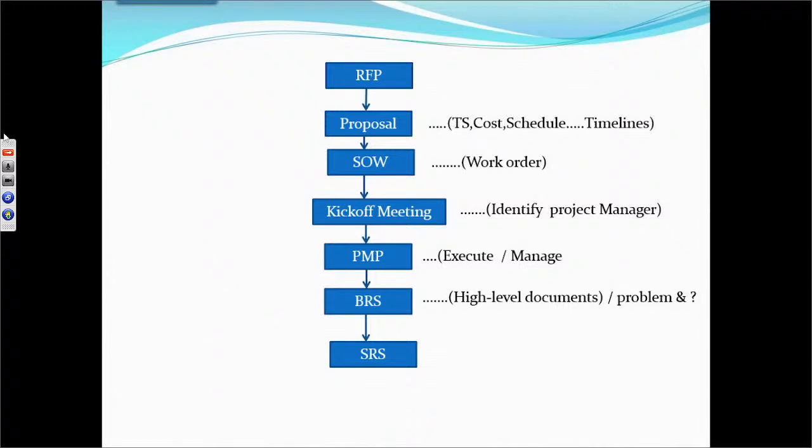What is the proposal? It says we are ready to do your project, and it gives the technical solution for that, the cost, the schedule, and the timeline. Each and everything will be written in the proposal document, and that document will be given to the client. If the client accepts the proposal, saying they are ready with the terms and conditions, then they will go with the SOW. What is SOW? Signed statement of work order. Now the client and organization have got the project.